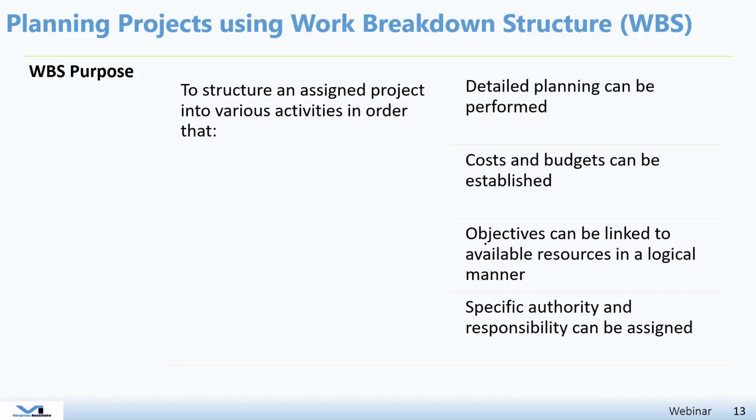So the WBS, or work breakdown structure, is the decomposition of your project objective into smaller manageable activities or tasks, and then you start estimating the duration, the resources, the budget of each one of these tasks, linking between them in order to come up with a plan for your project, the entire project duration, and how you are going to manage your project. And to do that, frankly speaking, you need more of your left brain because the WBS is more a technical tool than a communication tool. So here you will talk about the cost estimation, the budget estimation, the duration estimation. And to do that, again, you need to have high-level competence in analysis and calculation and such.